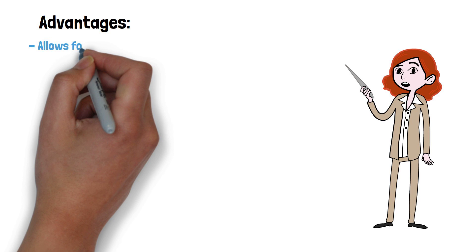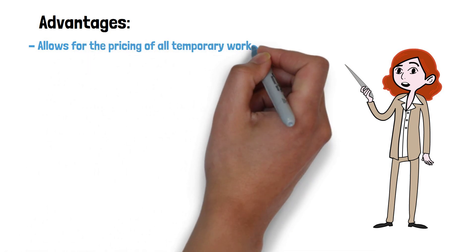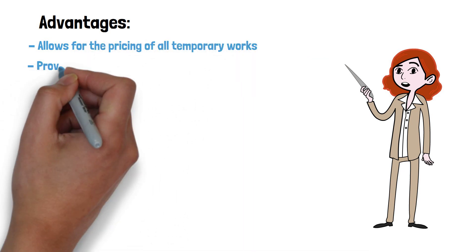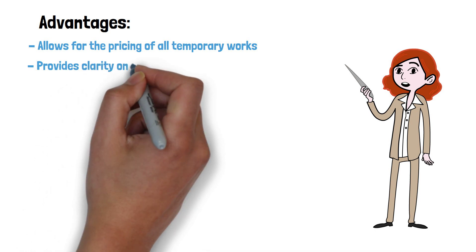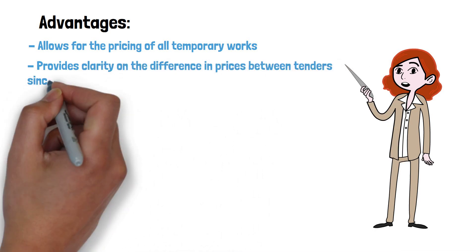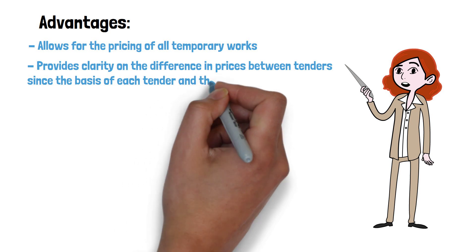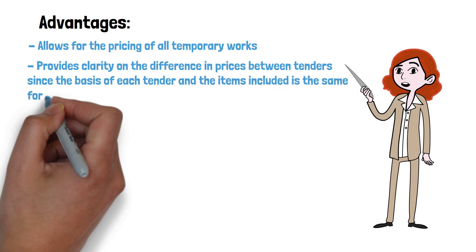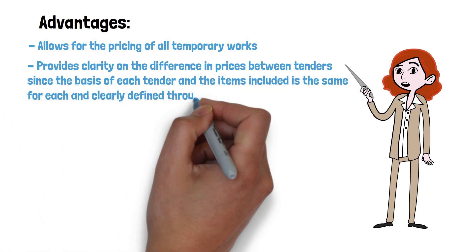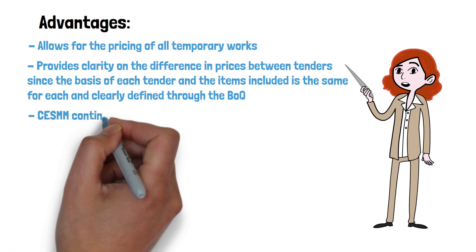Some of the other advantages it provides include allowing the pricing of all temporary works which do not form part of the final construction. It can also help to provide clarity on the difference in prices between tenders, since the basis of each tender and the items included is the same for each and clearly defined through the BOQ.